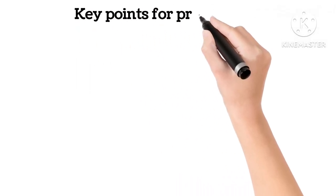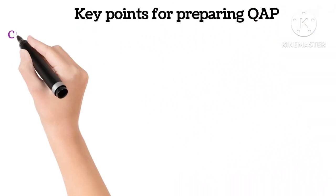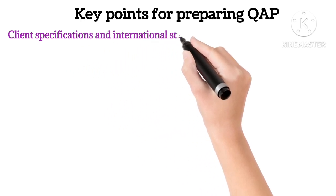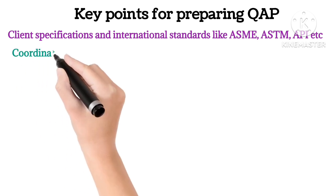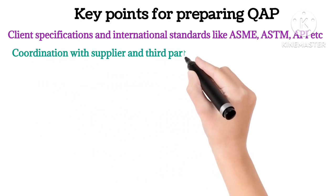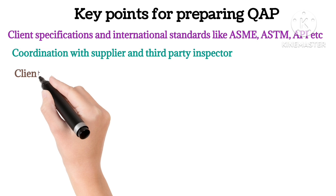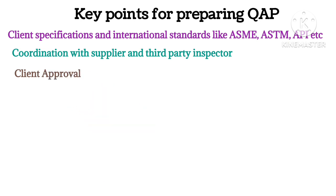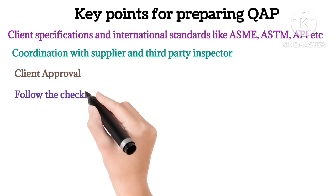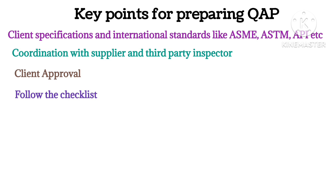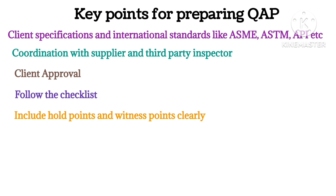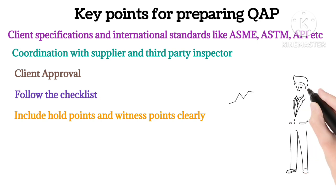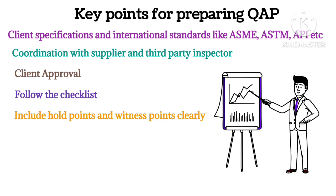Let's discuss some key points for preparing QAP and ITP. Always refer to client specifications and international codes like ASME, ASTM, API, etc. Coordinate with suppliers and third-party inspectors during document preparation. Get client approval before starting fabrication works. Use checklists to ensure completeness of the material. Include hold points and witness points clearly. Avoid copying generic templates blindly — tailor them to your actual product and process.